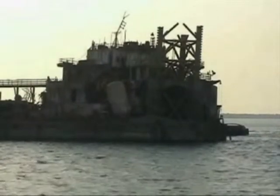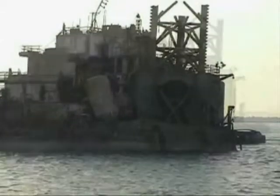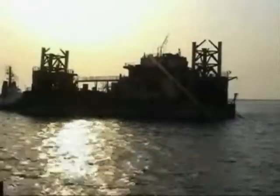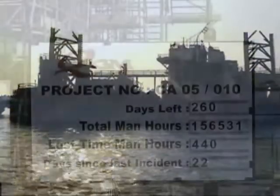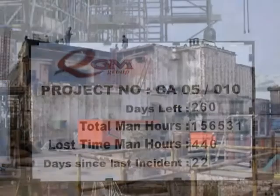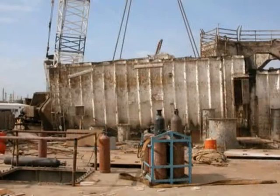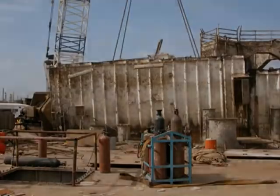QGM purchased the salvaged unit, and in early 2005, QGM, in collaboration with TECO ASA, began to rebuild the unit as a fully usable offshore drilling unit. To facilitate operations, the company Tool Drilling ASA was created, and a formal contract was signed in May 2005, clearly outlining a 14-month timeline within which QGM had to create a fully operational drilling unit from virtual ground zero.